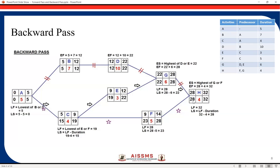Now to calculate the late start for this last activity: LS = LF − Duration = 32 − 4 = 28. In this way we calculate for all the nodes. Moving to the next node, this late start of 28 acts as the late finish for the preceding activity G. So for G: LF = 28, and LS = 28 − 6 = 22. So the late start for activity G is day 22.